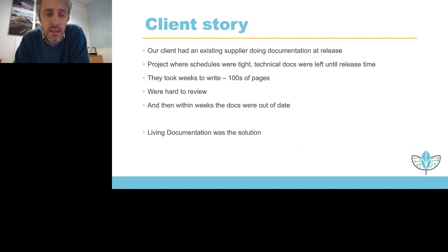Brief client story here. One project we were working with a client where they were outsourcing to another team, and that documentation wasn't being done as we went along. What happened when it came to release time is all engineers had to down tools for about 4 weeks, produce hundreds of pages of technical documentation, which is beautiful documentation, all technically accurate, but hard to write because you're not in the code at the time, and hard to review. And the most soul-destroying bit of it is within a few weeks, when they go back to the day job of engineering, it's gone out of date, so they don't refer to it anymore. Solution, living documentation.